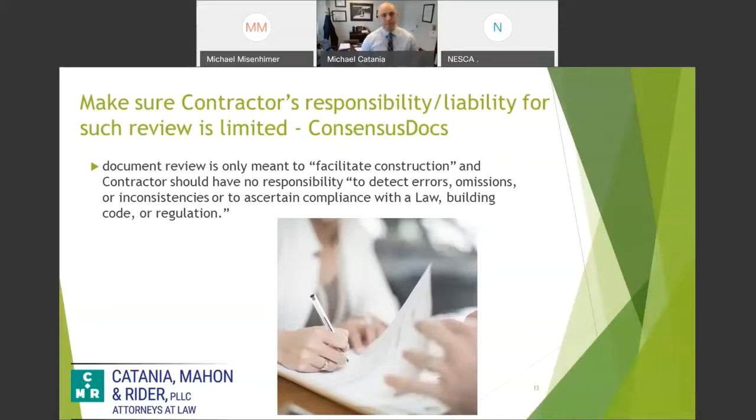In that vein, ConsensusDocs state specifically that it's only meant to facilitate construction, that you as a contractor have no responsibility to detect errors, omissions, inconsistencies, or compliance with the law, building code, or regulation.